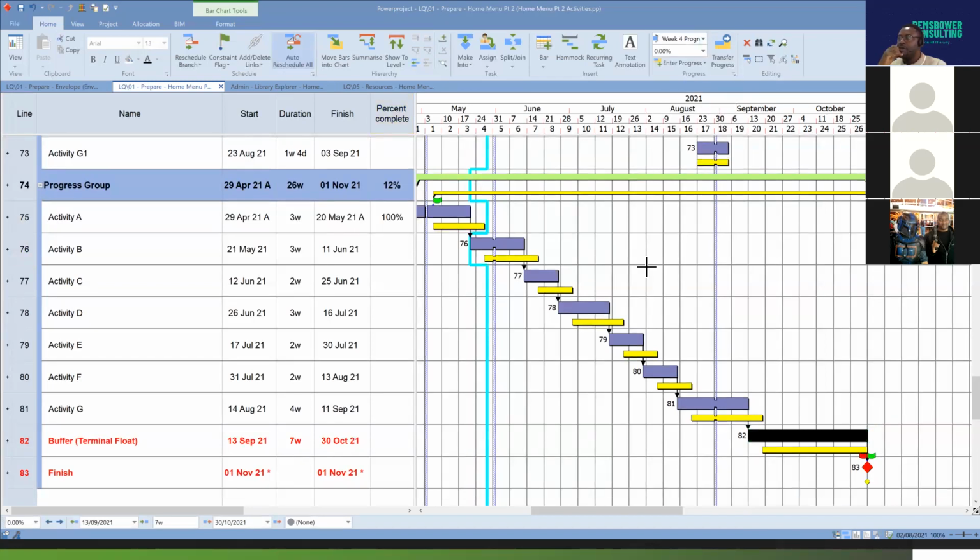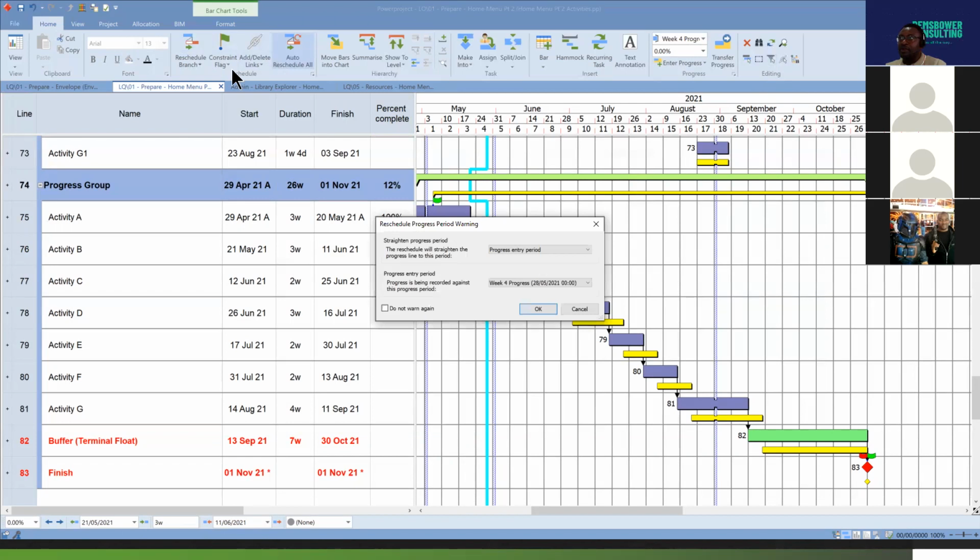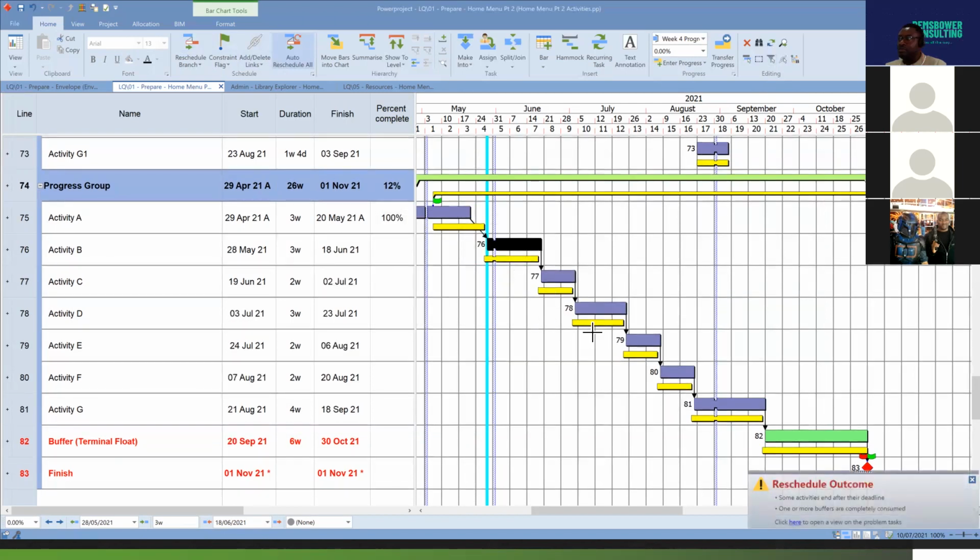Week 4, because this man didn't plan that he's going to start early, the fact that you've made gains in your project doesn't necessarily mean that you can consolidate on that gain, because if that succeeding activity is not prepared to start on that day, there's a likelihood you're going to lose some time. So nothing happened on that week because these guys were not ready. And we're going to reschedule. So the time you've gained, you suddenly have lost some time again. See how interesting it is, yeah?